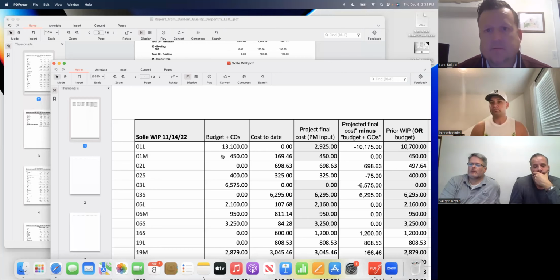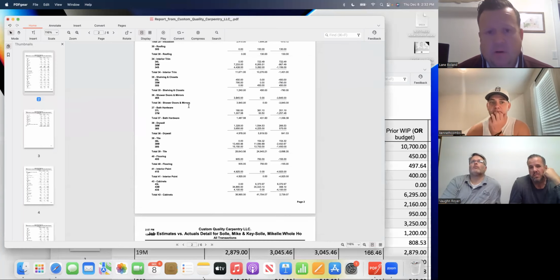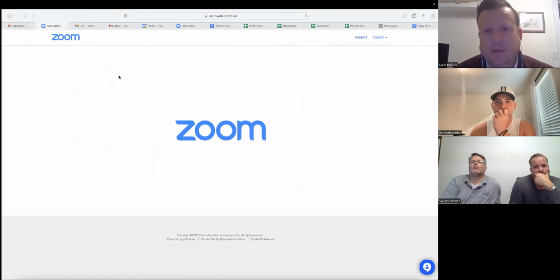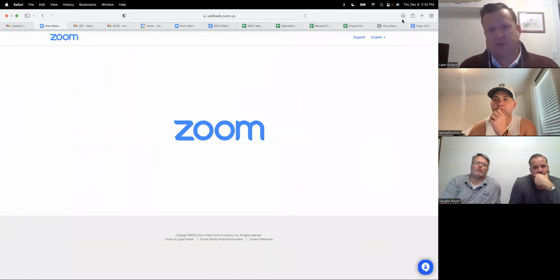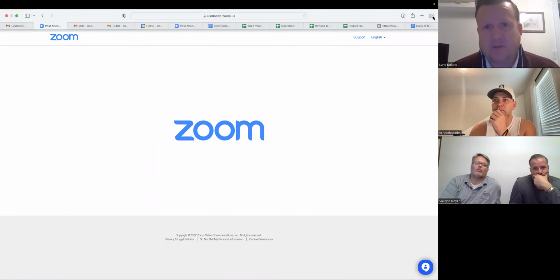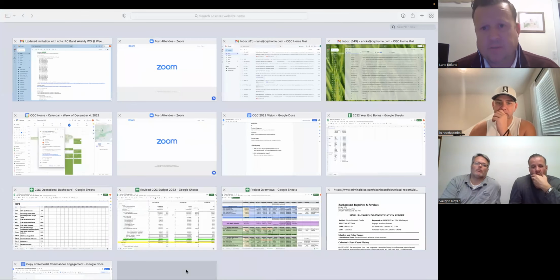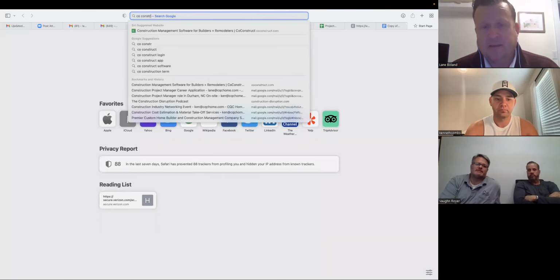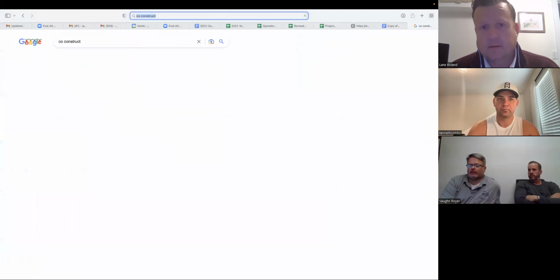Hey, so Vaughn, two best practices here. Towards the end of each trade on each project, the PMs are looking at, do we win or lose versus the estimate, and then from there looking at the remaining trades to see if there's any fat that we can trim by going to a different sub from the pre-construction phase. That's number one. That's the life I live right now, so I get it.